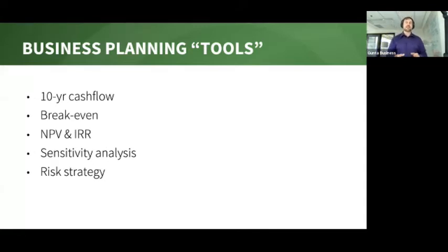What that basically means is that when you project your costs for 10 years and you project your revenues for 10 years, you start incorporating some scaling. Fuel is always going to go up, so you can give it an escalator, and cost of living is always going up, so you can add those types of things. But then it's important that in year 10, if you're making $900,000, what does that mean today? That's what the net present value calculation does: you discount future cash flows to present value terms.